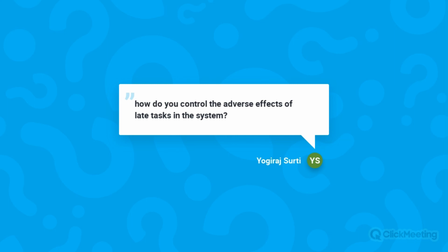So it provides you with visual data that something is late, and hopefully, if you're using that lean production plan properly, you have time before the end of it to catch up. Again, if it is late, it will keep that data, and we can see all the reasons why and start to predict any trends. If the reason it's late is not enough labor, and that happens 4 or 5 times, then in our commitment planning meetings, we can decide if we need to be better at organizing labor, for example. Hopefully that helps.